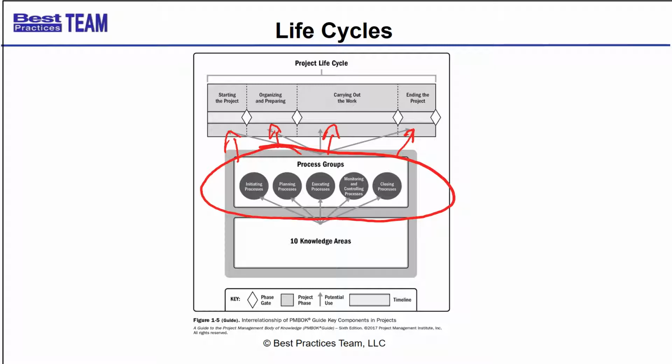So if you and your spouse have decided to remodel your kitchen and update the kitchen, you're going to put together blueprints up front. You're going to decide on what types of appliances you want, what types of countertops you want, what types of floors, and so on. And you get all that done up front at the beginning. But can you plan out the punch list at the beginning? Can you plan out the walkthrough and how the final approvals are going to go? No. You're going to purposefully wait to do the punch list, to plan the walkthrough towards the end of the project. So oftentimes we are doing some of the planning out at the end of the project.